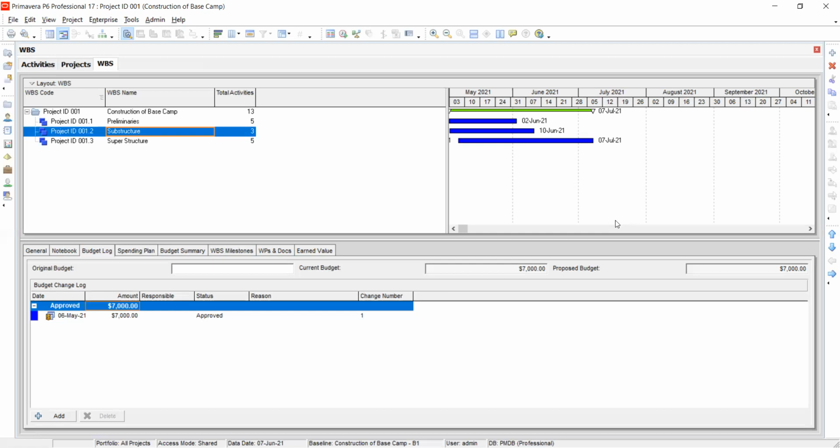The reason you can't assign a budget to activities is that, fine, it may sound right, and in the software you can force it, but those activities generate their costs according to the resources they consume. If you're doing a particular activity using 2 engineers who earn a particular amount of money, plus the aggregates, plus transportation, plus other money, that becomes its cost. For the activity, it will be a cost, not a budget.